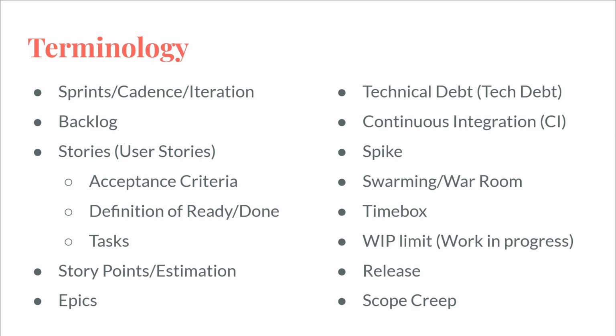And because it was missing some information, or this ticket just couldn't be worked on yet because it was waiting on some other ticket to be finished first, I wasn't able to get to this until the last day of the sprint, or I couldn't start on this at all. It should never have been brought in. And so that's the idea of definition of ready.